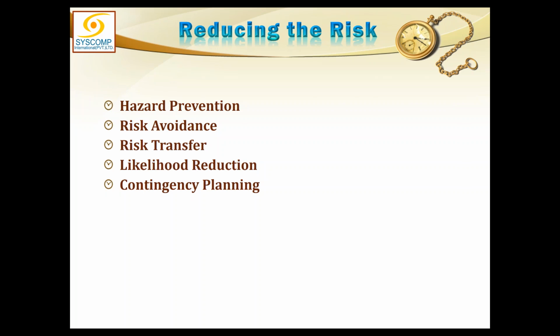So if either of these items is reduced, it will reduce the overall impact of the risk. And if somehow we can take care of both aspects, I can reduce the probability down to 1% and also ensure that no expensive items remain in that building. I make it a rule that there will be no antiques in the room, and only that furniture which is least likely to catch fire.